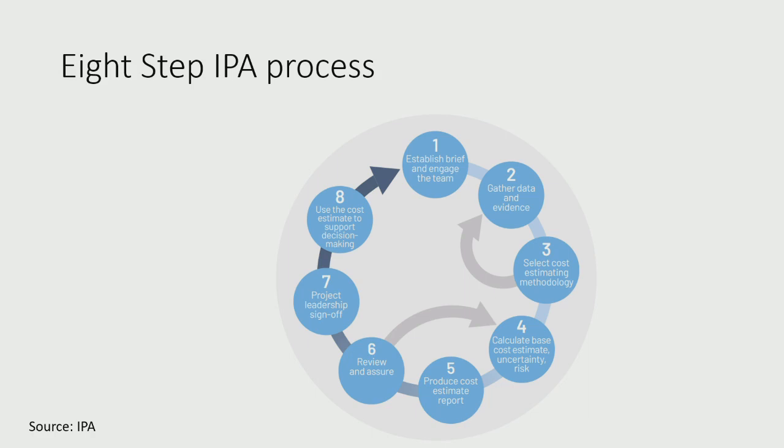Sometimes people think about cost drivers at detailed levels. Remember the project plan, our network diagram, where we had the activities and the resources, and we built up a schedule. So sometimes people look at cost drivers at that level and say, well, labor is a cost driver, because the more labor there is, the more cost it is. Or sometimes they say that the activity time is a cost driver. Or sometimes they say the material is a cost driver. That's the main cost. So sometimes people speak about cost drivers at a detailed work package level in terms of things at high cost.